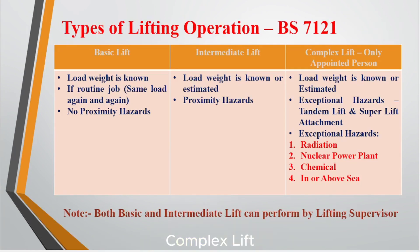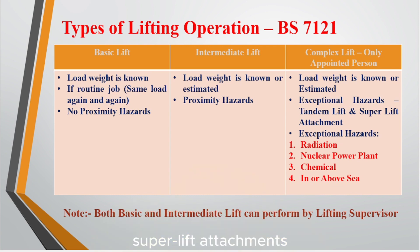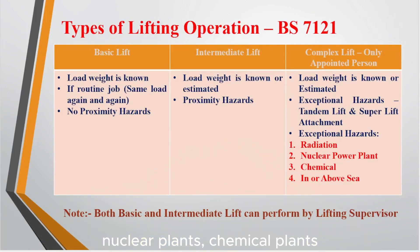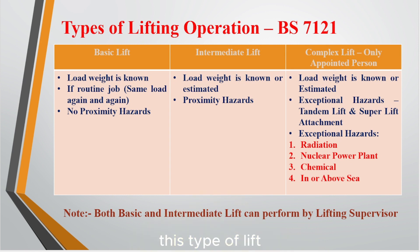Complex lift: load weight is known or estimated. Involves exceptional hazards such as tandem lifts, superlift attachments, radiation areas, nuclear plants, chemical plants, or above-sea lifts. Only the appointed person can plan and supervise this type of lift.